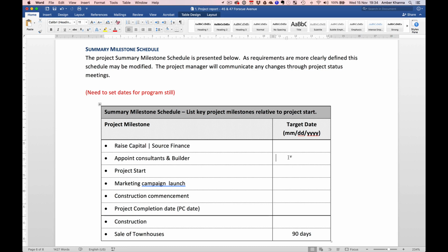Can you give me a quote to do everything, to do the working drawings, to engage all the consultants, to complete the working drawings and get a building permit? So they'll give you their fee proposal. And that way you can add that fee proposal in your feasibility, attach it to this report and show them that this is what we need. This is the money that we need up until construction.